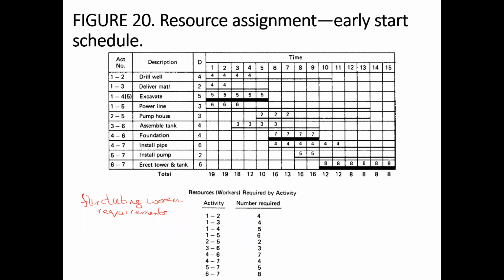So that means this will not be good for the morale of the workers. Okay, so for example, out of these 19 workers, 1 worker will always think that he will lose his job after the 2nd week. And similarly, after the 3rd week, 6 of the workers will think that they will lose their job after 3 weeks. So there will be a constant hiring and firing of the labor, which will not be good for the morale of the worker. And maybe in those situations, the company will not be in a good position to properly hire and fire the laborers in that time.